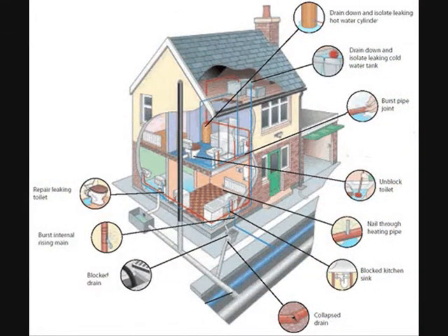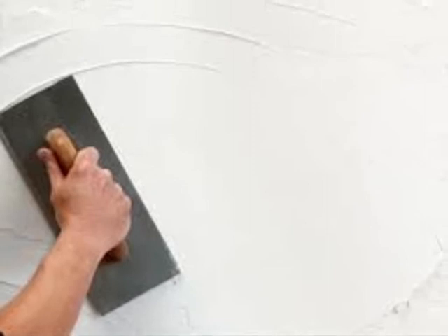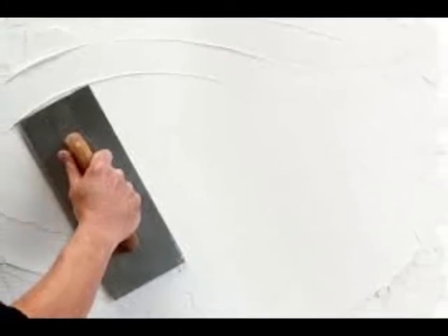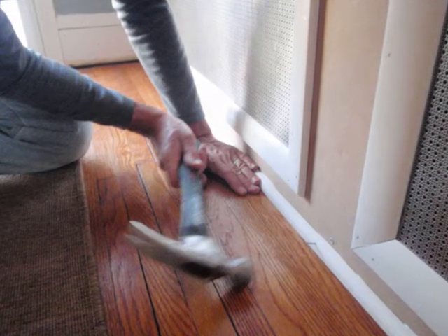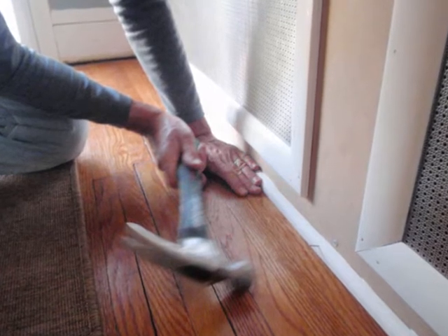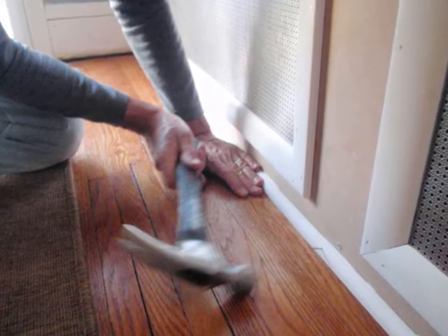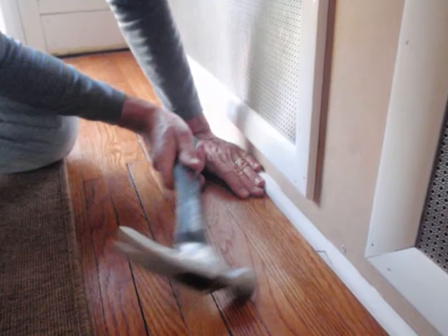Electrician, first fix. Install all cables, consumer units and conduits prior to plastering. Plastering. Apply plastering system to walls and ceilings. Joinery, second fix. Fix new timber door frames into blockwork openings. Skirting, architrave. Six panel doors and door furniture are to be fitted by client.